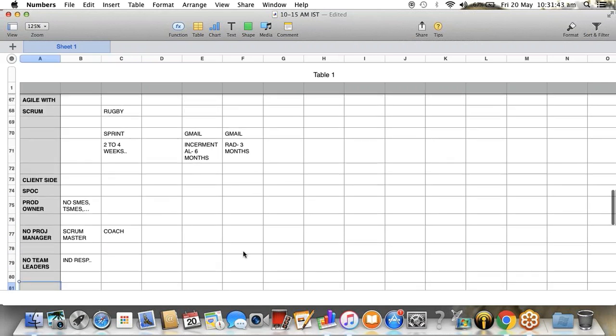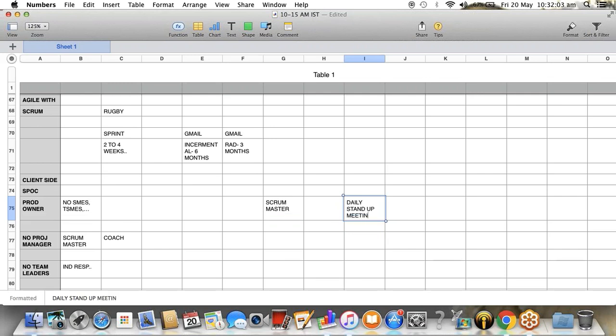Okay, right. So now, if there is no team leader, then who will look into the tasks, like what is happening every day, the day-to-day activities, and who will inform the scrum master? It means the scrum master himself or herself. The scrum master is the one who conducts a meeting known as the daily stand-up meeting. It happens once in 24 hours, and the scrum master will send an automatic invitation every day. Let's say your office starts at 10:30 or 10:45, the invitation will be on your desk. You have to attend this meeting.